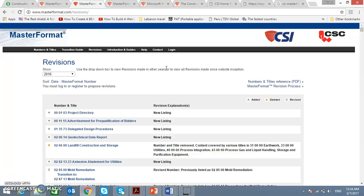The consultants will download this generic specification and tailor it according to their project. Consultants are not specialists in everything, so they also do some subcontracting — like for soil study, they bring a subcontractor to do the study. For structural work, they bring someone to do the structural foundation and make the specifications. Some specific sections, like fire suppression, may also be subcontracted. All these modifications are gathered together and they develop a specification for the project.